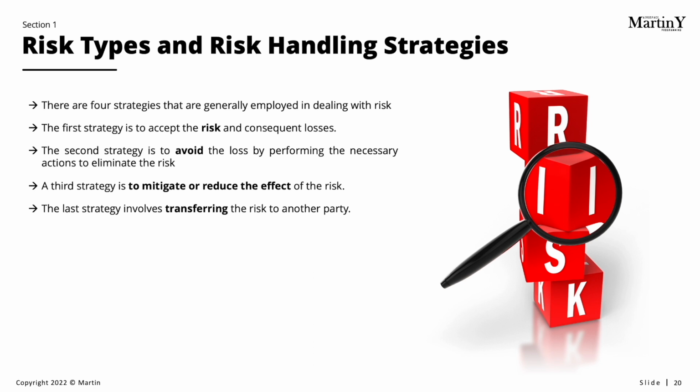There are 4 strategies that are generally employed when dealing with risk. The first strategy is to accept the risk and the consequent losses. The second strategy is to avoid the loss by performing the necessary actions to eliminate the risk. The third strategy is to mitigate or reduce the effects of the risk, and the last strategy involves transferring the risk to another party or partners of your company.